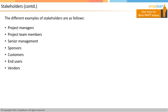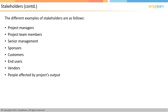The vendors or suppliers who provide goods or services to the project are important stakeholders. People whose lives may be impacted by the output of the project are also stakeholders. For example, if a highway project requires possession of privately owned land, the people whose land is being taken away are stakeholders. If the construction of a dam or water reservoir benefits downstream farming communities, they are stakeholders too.